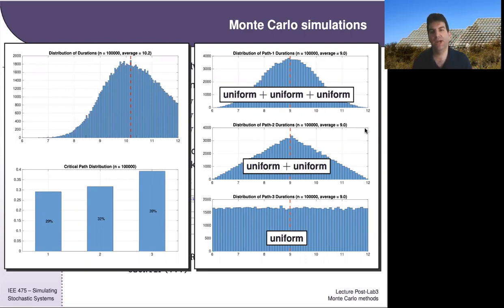And it's just going to be very, very rare that if you add up 3 activities, all 3 of them will end up taking the longest amount of time. Sometimes it'll be pretty likely to have the first one take a long time, the second one to take an extremely short time, and the third one to maybe take some intermediate time. So that's the reason why, as you start adding things up together, you add a level of independence to the execution where it sort of prevents these extreme events from happening, because these extreme events mean extremely unlucky, because every one of your independent subparts would have to also be in an extreme case. And that's just not going to happen very often.